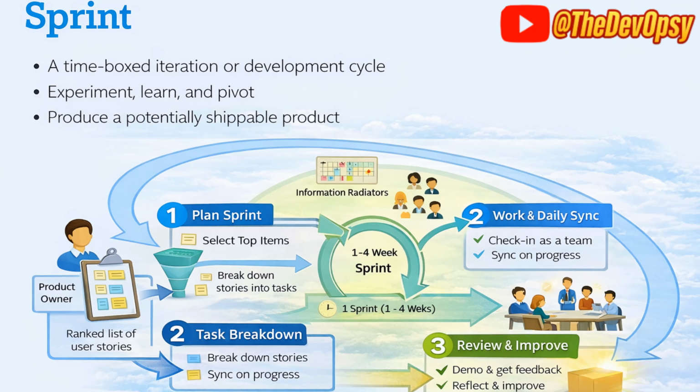What happens in this particular sprint? In a 1 to 4 week sprint, you have a daily stand-up or daily Scrum every 24 hours. It's prescribed that it happens at the same place at the same time. Any time would be good, whether it is morning or evening. And you have to answer a few questions in that daily stand-up. We'll come to that. I think we have a slide on that as well.